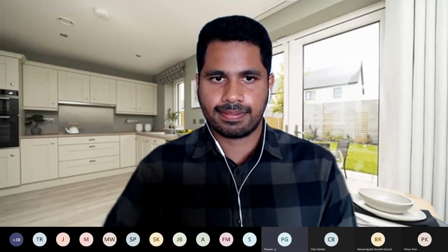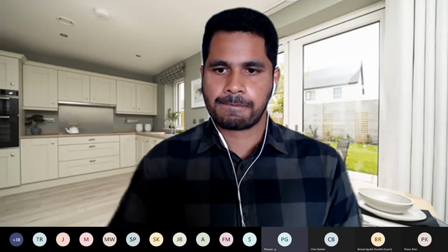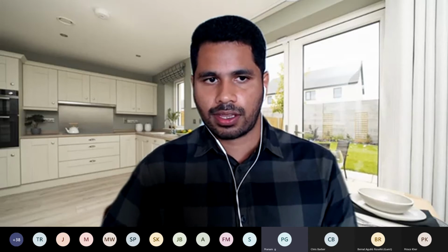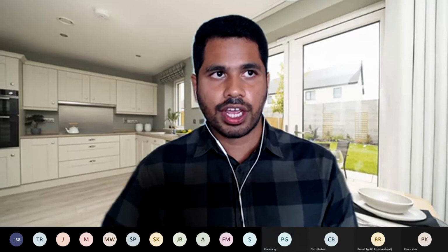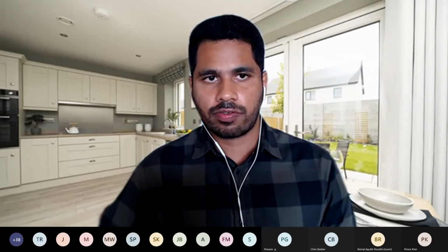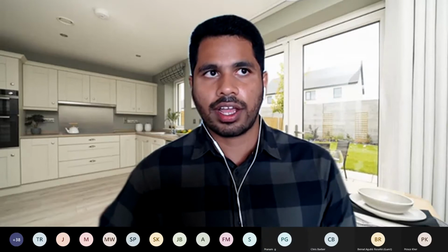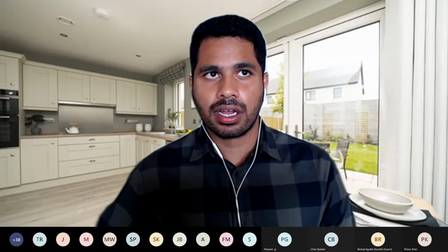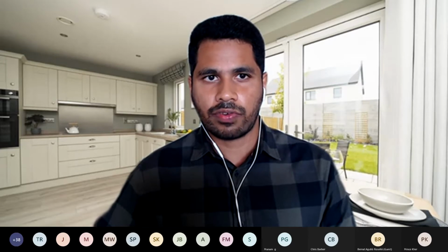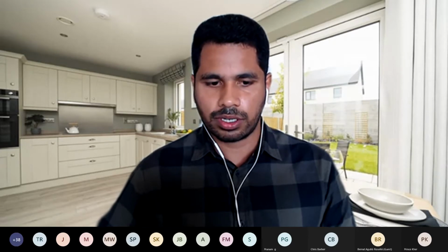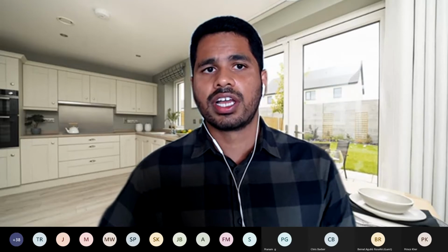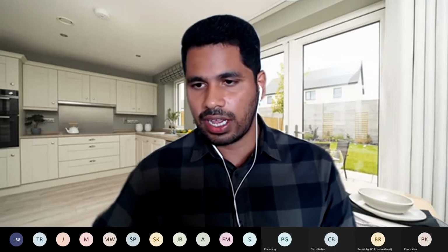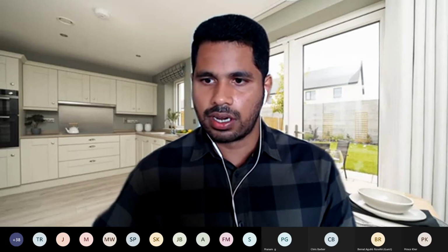Okay, thanks, Venkat. And how about Microsoft Project Online? Do we have a native connector to connect to Power BI in that case? Microsoft Project Online has two versions, Project Plan 3 and Project Plan 5. Project Plan 5 definitely has direct connectivity with Power BI.